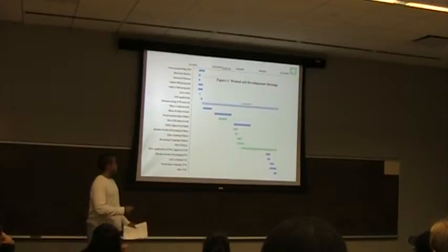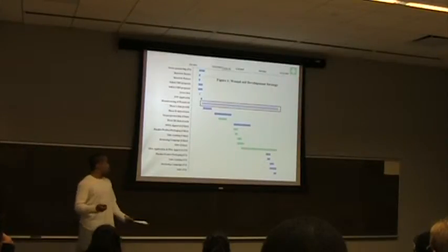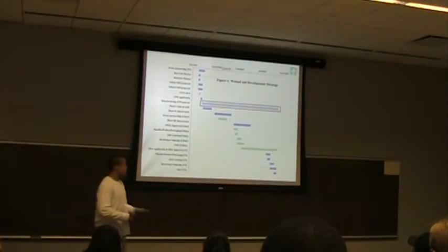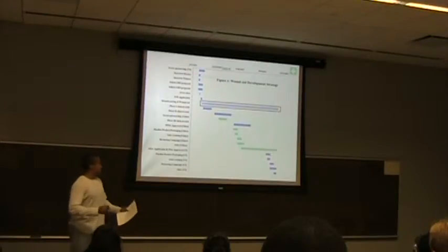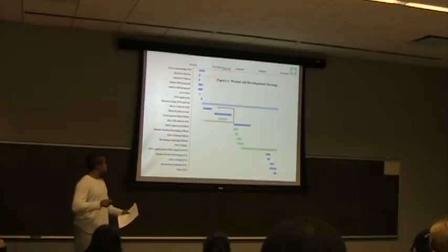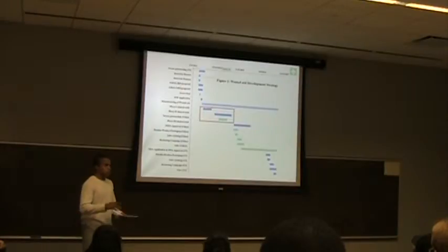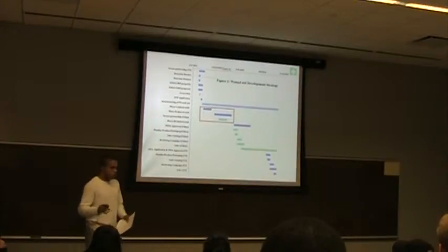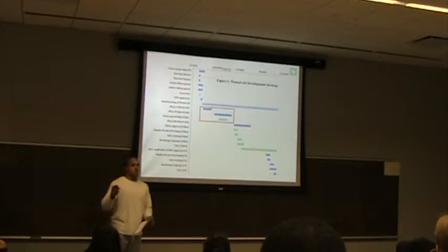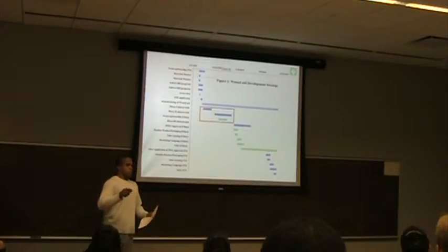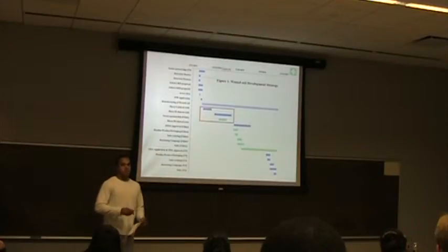So first, we're going to start with the manufacturing of wound aid, after we've already built up our U.S. partners, including our contract manufacturing and our contract researching. The next phase will be the beginning of clinical trials. While we're going through clinical trials 1 and 2, sort of midway through the second clinical trial phase, we plan to begin establishing relationships in China. This way, when we are ready to move into China, we already have existing relations.